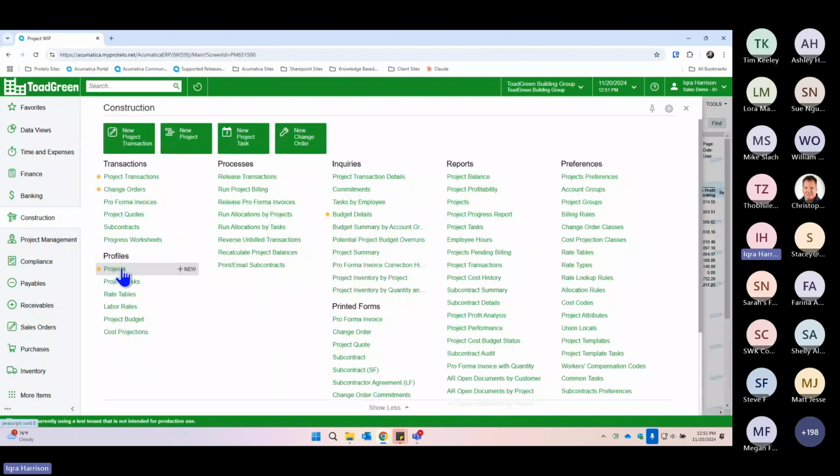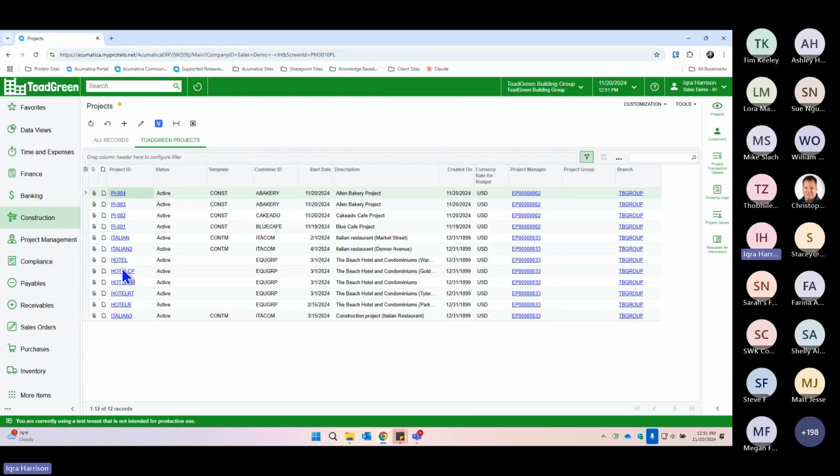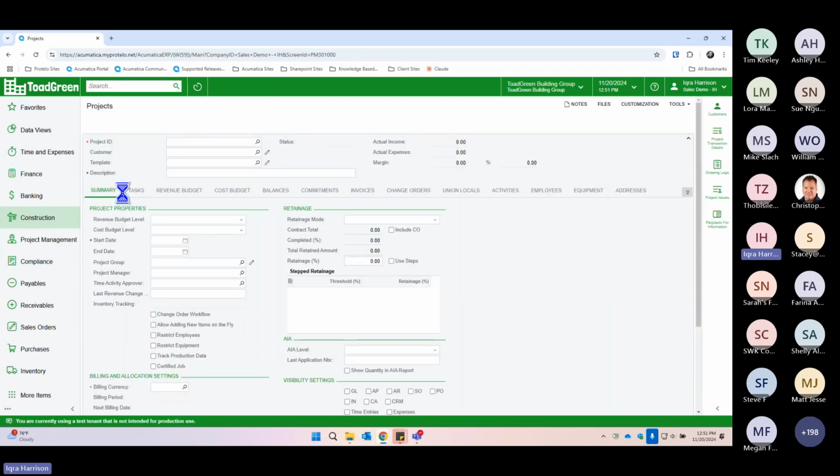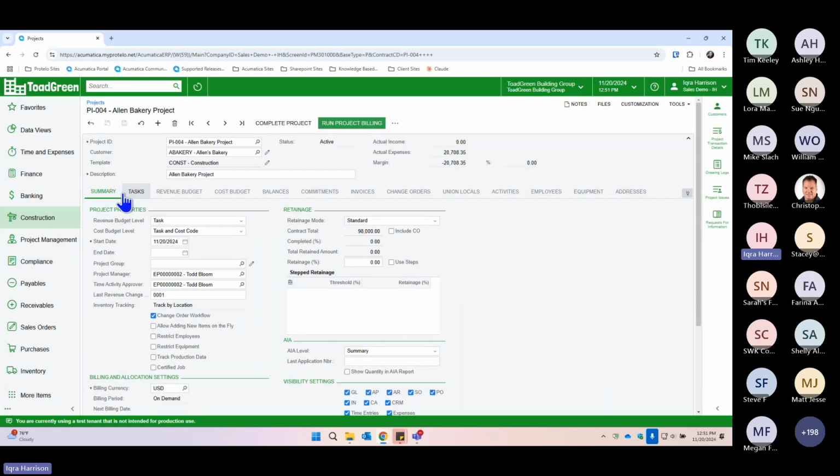So we talked a little bit earlier on about the performance percentage and how that can vary from your actual percentage complete. That number typically comes from your field staff, and you can't really always tell from your numbers alone, but you can tell if things are going too well or not good enough, when the numbers are off too.